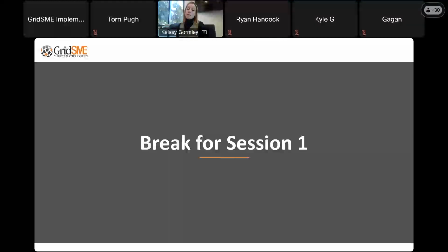Well, I'm happy to wrap up with some best practices and lessons learned. I wrote a couple of things down here, and I hope these will be key takeaways for everybody. Make sure, again, that the correct legal entity has been added to the interconnection agreement before we start the process. That can really hold us up, unfortunately, if we don't have that in place. Understand what the parallel processes are from a utility perspective and a CAISO perspective. When we're talking about the PTO sync approval letter, a lot of those utility requirements can be done in parallel with our bucket 3 submittals. So in an ideal world, we would be submitting that bucket 4 PTO approval letter as soon as it's available, so we have that out of the way.